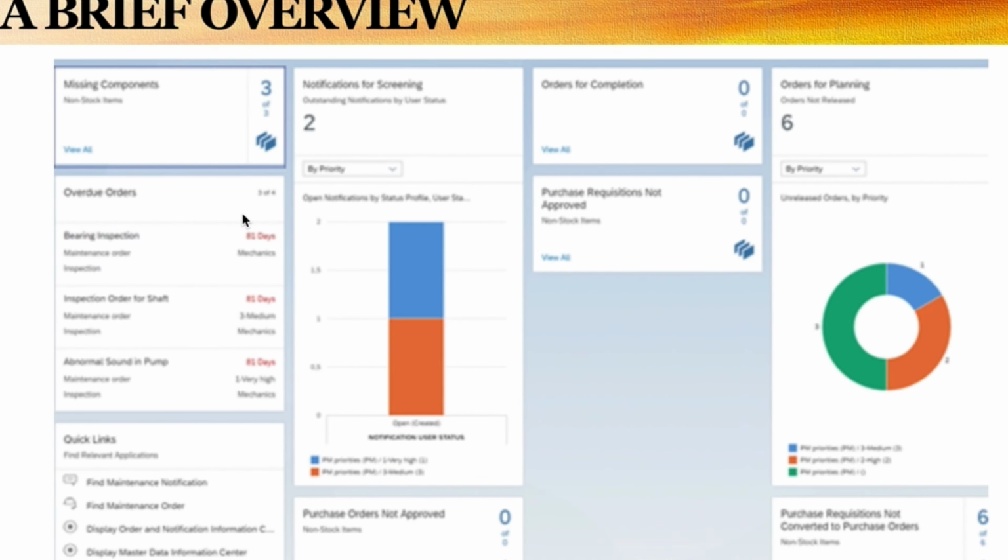But the system is automatically giving you a calculation, so the planner can go into the orders. You can actually click on this order, it will take you to the order, view the order for you, and get the operations list view, so that you can see information like the work centers and all of that, or maybe the time confirmations that have been confirmed from this time. So you can basically do all of your analysis on the system without needing to export to Excel.